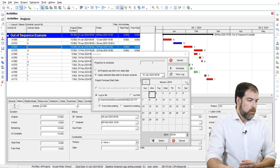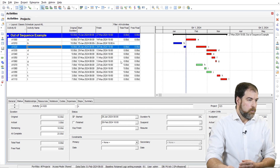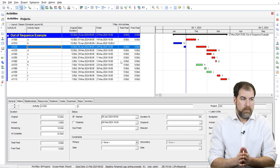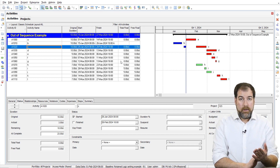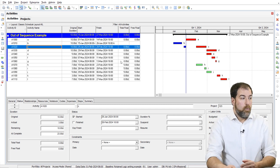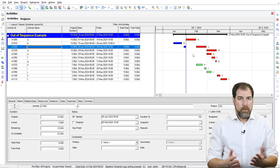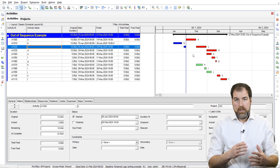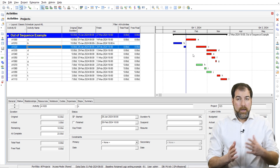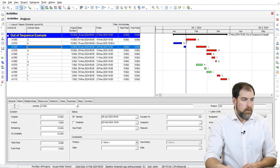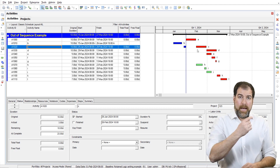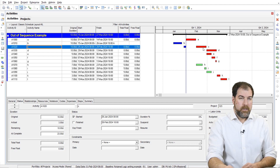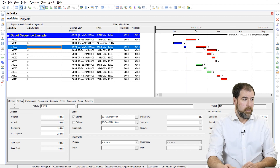I move my data date to the beginning of February, reschedule the work, and have a look. Now we have an out-of-sequence situation — I planned to do A first, but I did B instead. What's going on on the Gantt chart? We're using Retain Logic — one of the settings you've probably heard about in P6. Retain Logic says, regardless if you did things out of sequence, keep the original logic alive. Notice that A is butted right up against the data date. It's saying: stop working on C, go back and do A, and then come back and finish C — because that's what you originally planned to do.